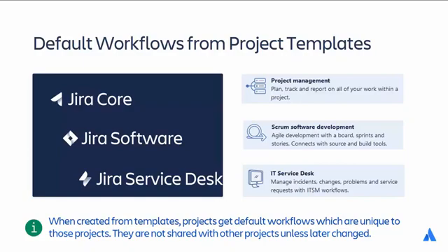Each project which is newly created from a project template gets a set of schemes based on the default schemes for its project template. Some of the associated schemes are shared with other projects, and some, including the workflow scheme, are unique to the project. This means that they can be modified and the changes will not affect any other project. Bottom line, when created from templates, projects get default workflows which are unique to those projects. They are not shared with other projects unless later changed. Let's look closer at these defaults.